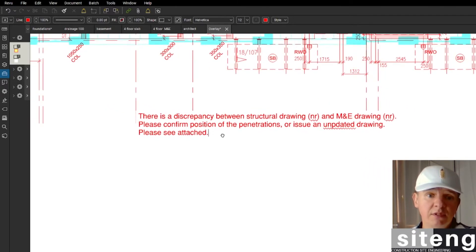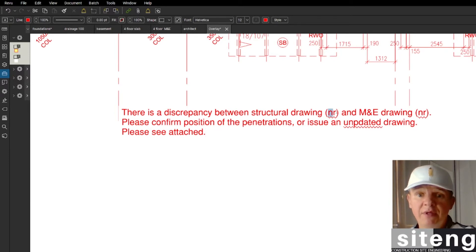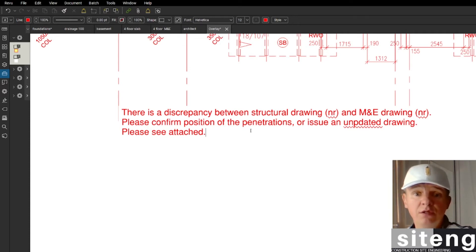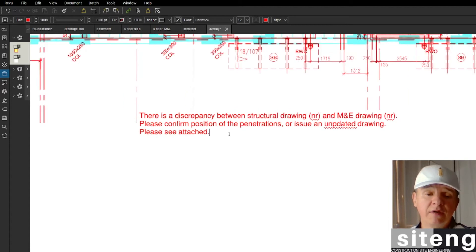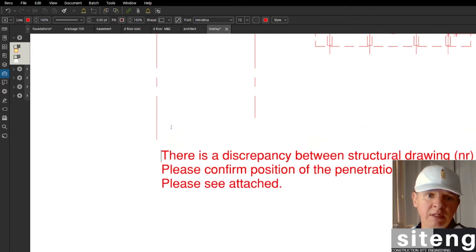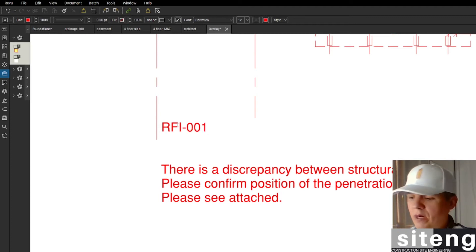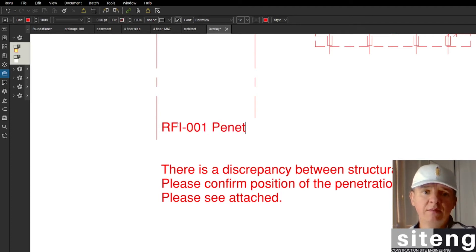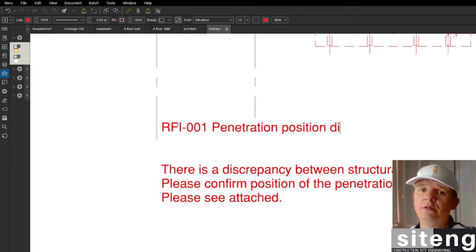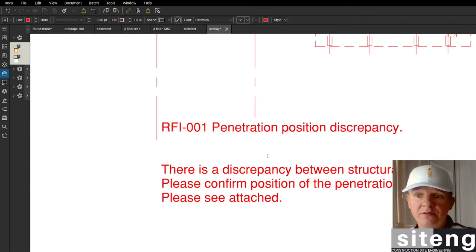Once you read this as a designer: 'There is a discrepancy between structural drawing [number and level] and the M&E drawing. Please confirm position of the penetrations and issue an updated drawing.' The RFI will also need a number so you can keep a tracker. That would be RFI 001, with the title 'Penetration Position Discrepancy.' That's all you need — that's how you raise an RFI.